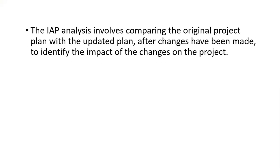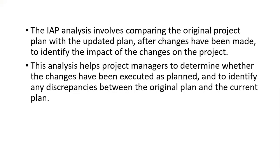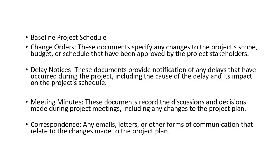Recently I have shared with you the primary P6 dashboard. That is what we are going to do - we are going to make changes in baselines with delay event insertions. This analysis actually helps project managers to determine or find out whether the changes have been executed as planned.